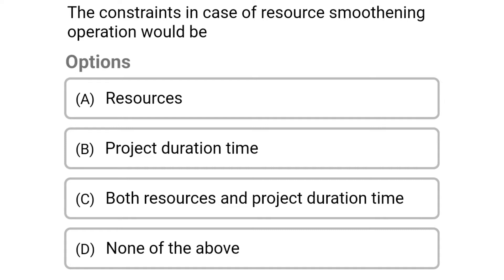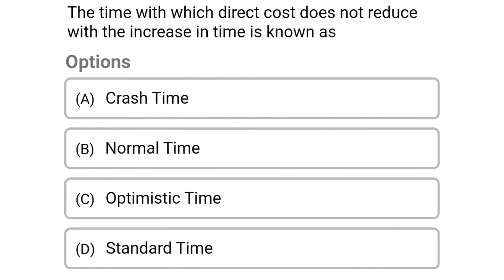Next question: the constraint in case of resource smoothening operation would be — option A: resources, option B: project duration time, option C: both resources and project duration time, option D: none of the above. The correct answer is option B: project duration time.